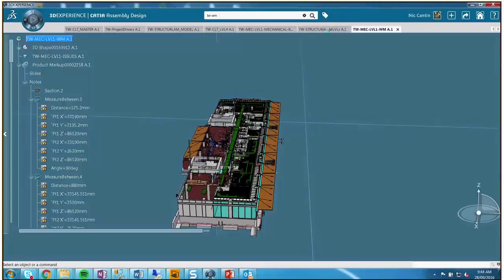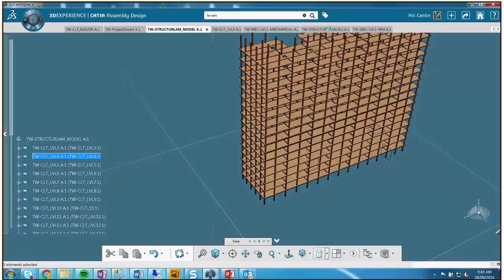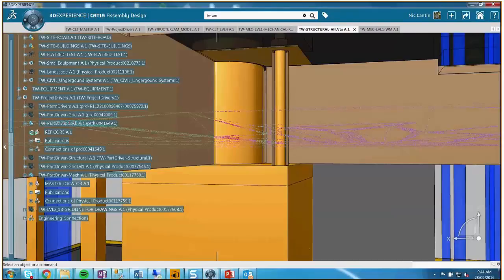They could have gone faster. They got stopped by not planning for the stud. The inside wall stud was the one that delayed the whole project, just because that was the only thing that was not prefab, it was done the typical way. The walls. And then for code, they had to close the building, so they actually had to slow down for them.